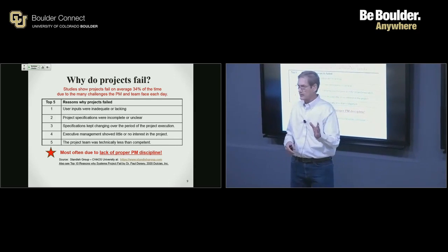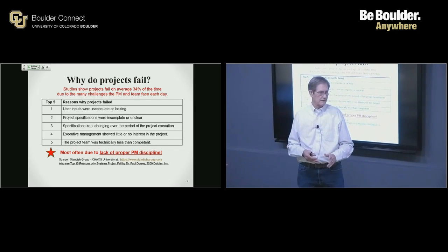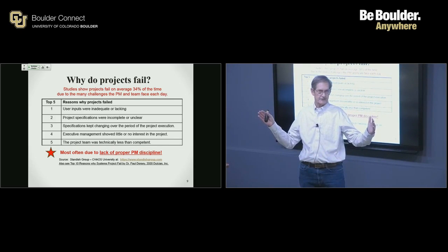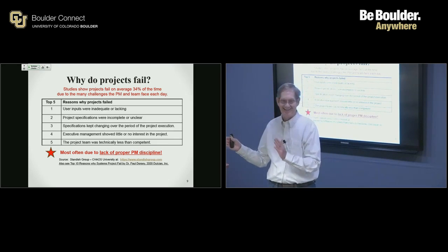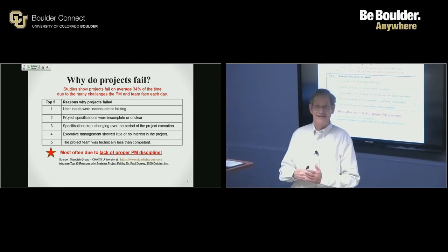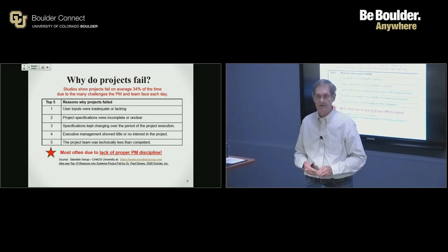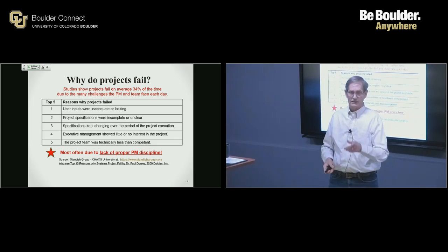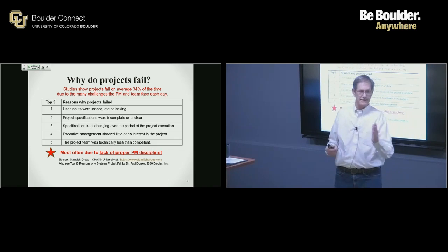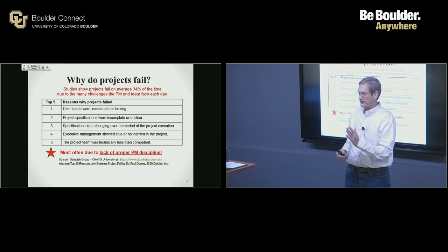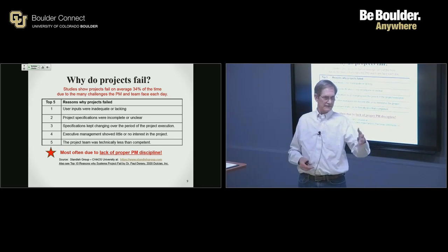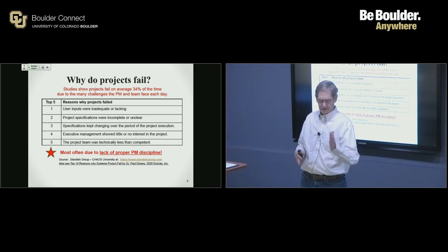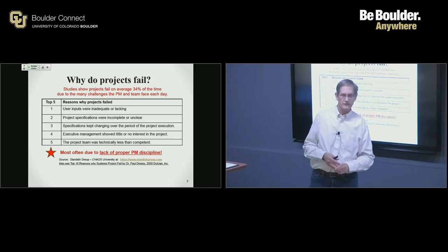You're really close to the one thing I'm looking for here. Anybody, Ryan? 12-month project. When did they present to the customer? Aaron? Or talk to the client before. Yeah, communications we touched on. I think you're on the right track. But at the end of the day, you don't wait 5 months on a 12-month project to put it in front of the customer. You check. I think that's where you're going. One of you were going with checkpoint earlier and often on the project.